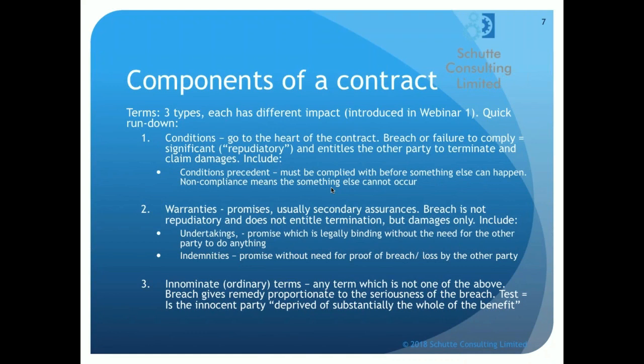Now, a breach of a warranty is not repudiatory. It is important and significant to the project, but it's not so significant that it goes right to the heart of what the contract is all about. And therefore, breach is not repudiatory. It does not entitle termination, but it does entitle the innocent party to claim damages for any loss which ensues. The term warranties includes undertakings and also indemnities. So we've got different types of warranties.